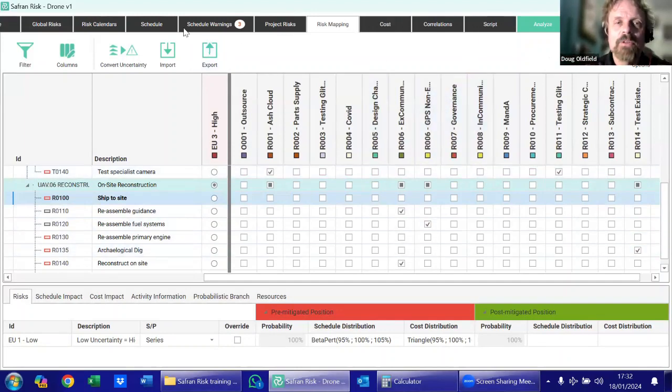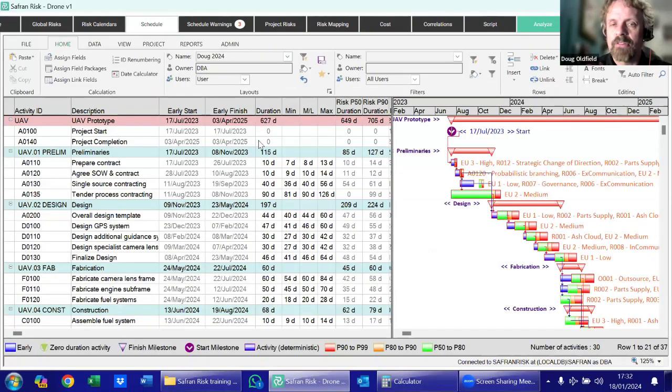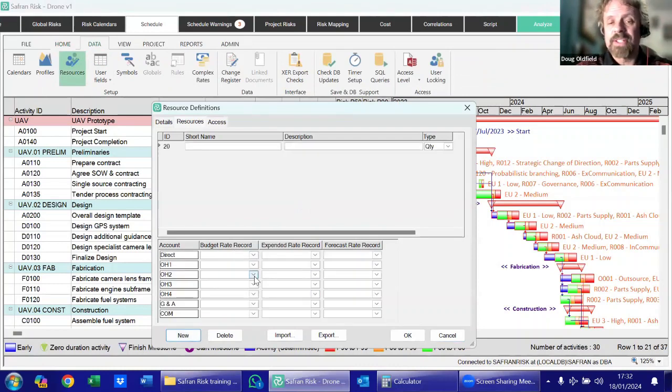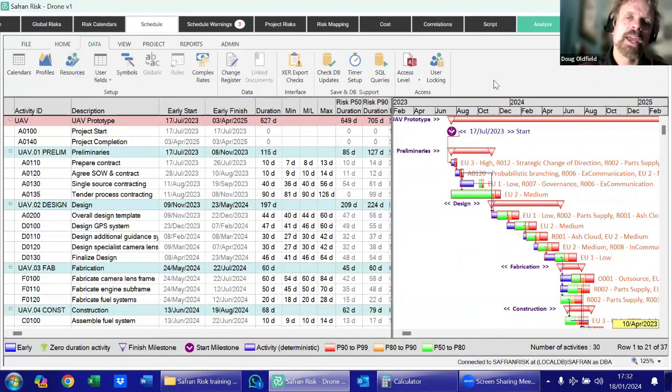So, if you think that this schedule here has been created in a project management system like P6, a resource loaded schedule, the addition of a resource loaded or cost loaded schedule would be that each of these activities within the model might have some different resources allocated to it, and then in turn those resources might have a particular cost or quantity, and we can start to build up a view on our costs. But everything is driven by the WBS.